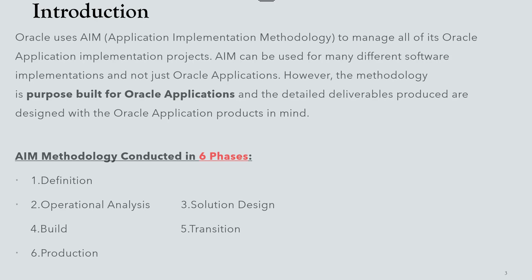Phase five is Transition. During Transition, the project team deploys the finished solution into the organization. All elements of the implementation must come together to transition successfully to actual production. The project team trains end users while the technical team configures the production environment and converts data. Transition ends with the cutover to production, when end users start performing their jobs using the new system.